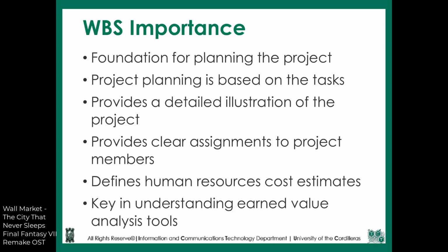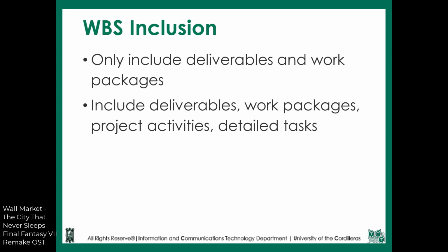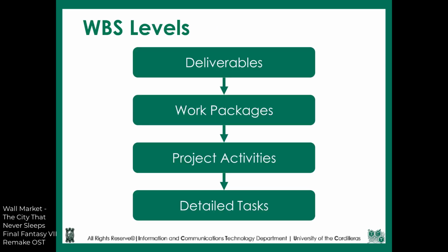When that shall be done later, the WBS will be the basis of comparison. Moreover, having a thoroughly planned WBS would also mean that the actual work may be similar to the planned work, which is ideal. In a WBS, there are 4 levels: the deliverables, work packages, project activities, and detailed tasks. Here we have a visual representation of the levels. With that, let's look into them.